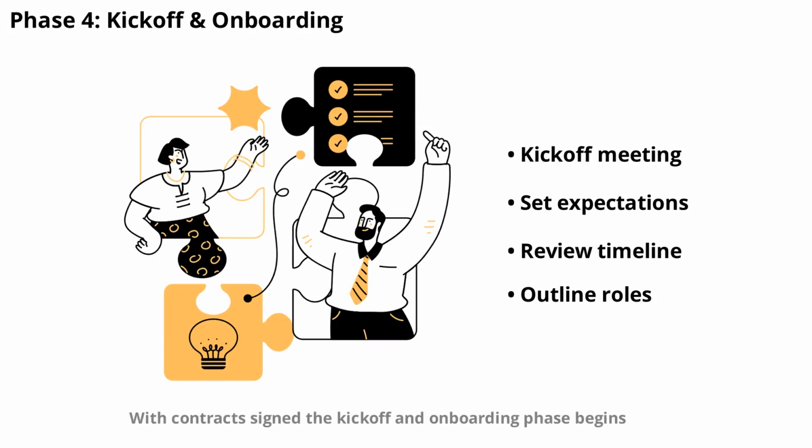With contracts signed, the kickoff and onboarding phase begins. This is where your project team meets with the vendor's implementation specialists to set expectations, review timelines, and outline responsibilities. A well-structured kickoff ensures everyone is aligned and ready to move forward. This phase usually lasts 1 to 2 weeks.